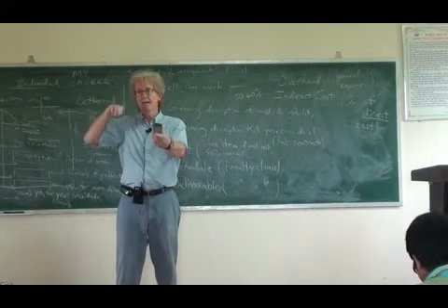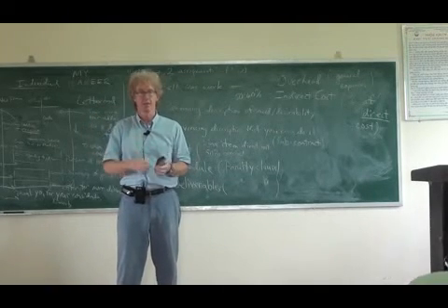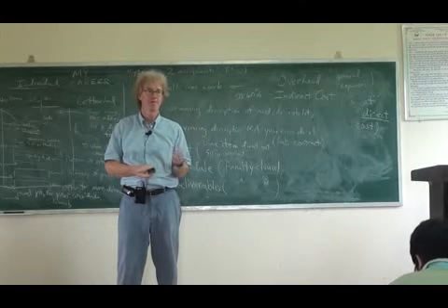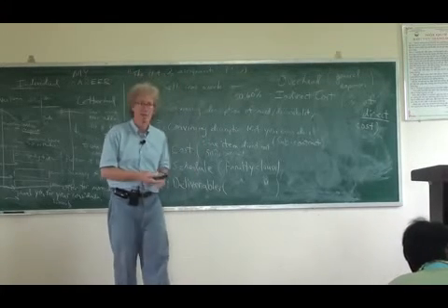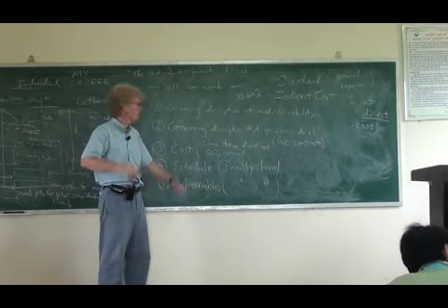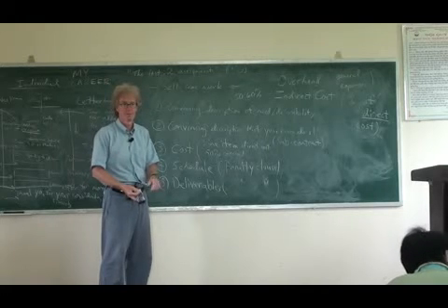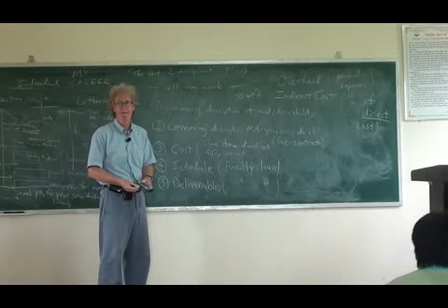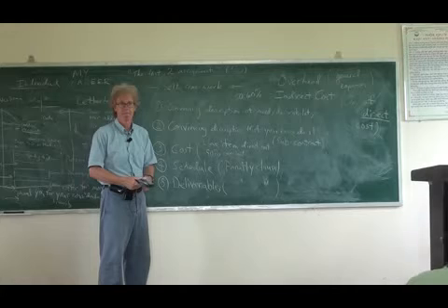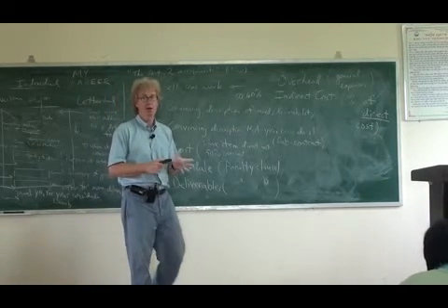So your line item budget that's going to come back to me, maybe you'll have 10 or 20 things in it. Maybe 5, whatever you need. Then you add all of those together, and then you'll have one more item, which is 50% overhead, and then you'll have the total total. Okay? Sound interesting?